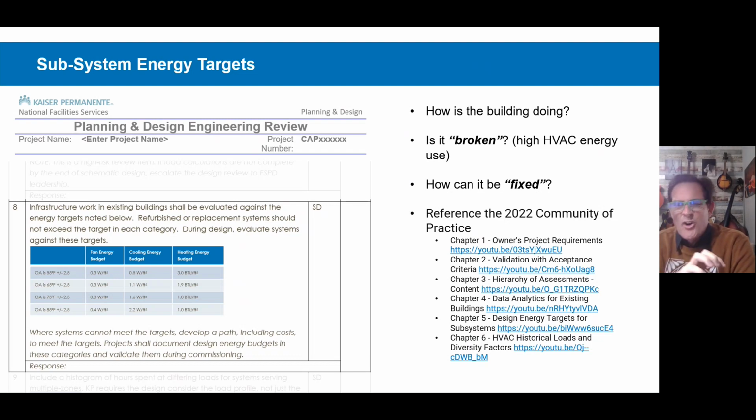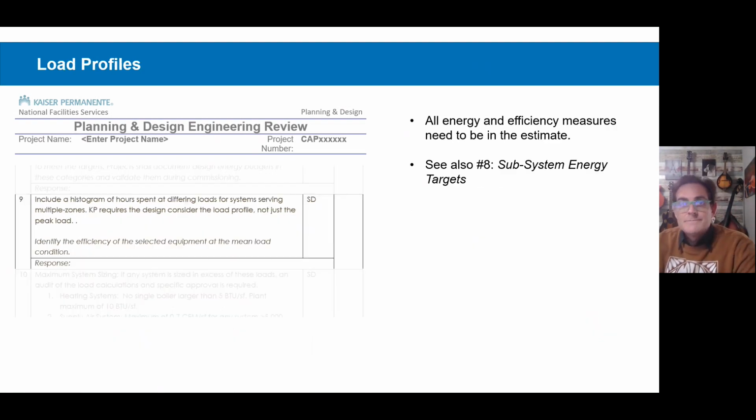Nowadays, usually before you start design, my engineers are running that 3-year historical utility report and putting it in the project. So if it's not already sitting there in eBuilder when you show up for work on the first day, then request it and we'll get that to you right away. You have to know where you stand in order to see where we're going to go with energy on a project.